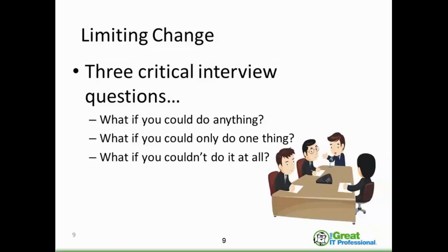Please wait, because a lot of times when it comes to change, people have not thought through the impact of those changes on our ability to deliver something in the short cycle. But these are three questions when somebody comes to us and says 'I really need to make a change.' First: What if you could do everything you want - how would the world look different? That's a different question than we're normally asking. Then we can start explaining to them how it's no longer a short cycle time project. But then back them off from that: Out of all those things you've just declared, what's the one thing, if you could do just one thing, which one would you want?